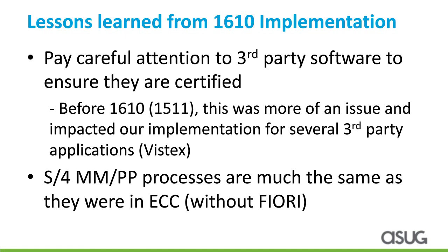Sean, anything else, or Tony, do you want to add on this one? I would just say be mindful of the timing, even after a release of S4. So if 1810 is released in October, the partners may take an additional 3 to 6 to 9 months to certify their product against that. I know we ran into that scenario a few times during our implementation. Yeah, it's not just the release date of the SAP product. It's going to take that lag time to get everyone caught up. Yep, thank you. That's a very good point.